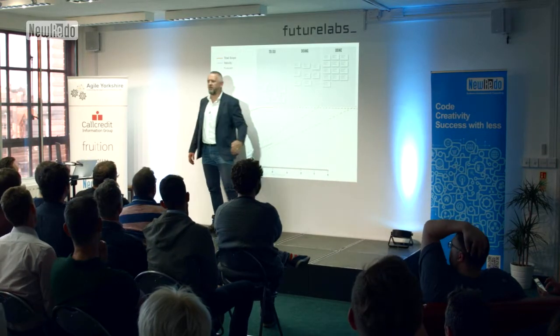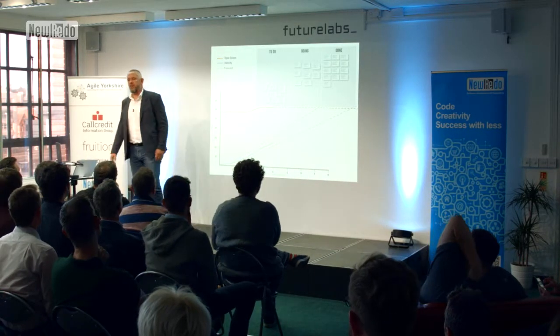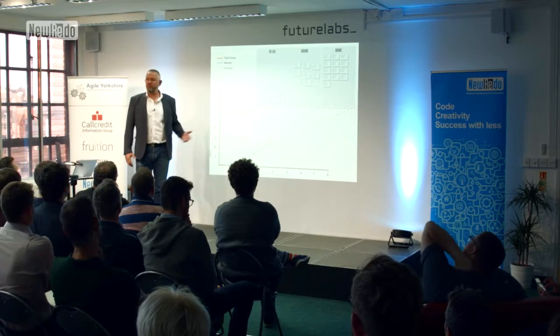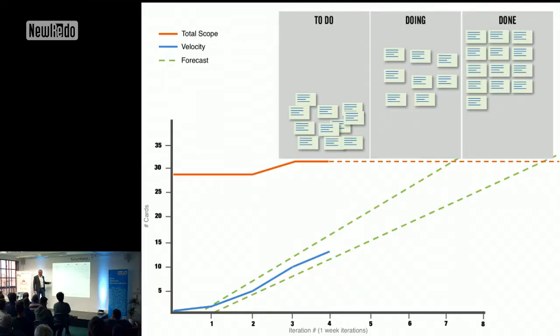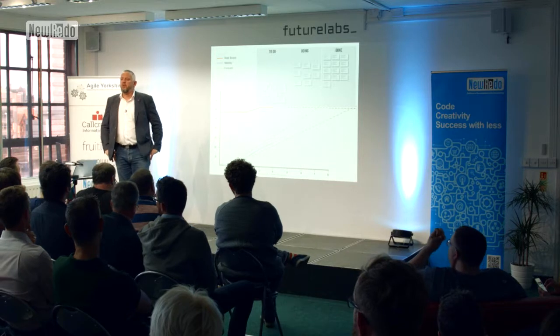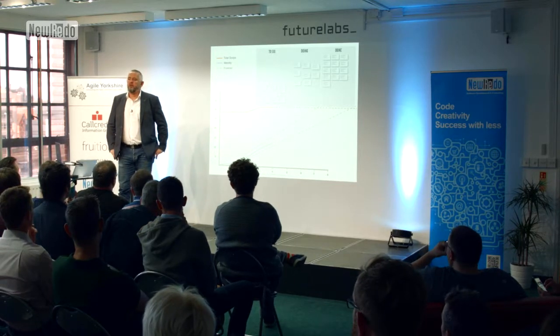So I think the beauty of a burn up chart is it tells a story as scope changes. Yeah, this has gone up. Well, why did that go up? What happened there? Based on what you said about short term, that's exactly what I'm using it for. Literally maybe a week or 2 weeks, just to get an expectation of when we are actually going to deliver this, based upon the estimates.